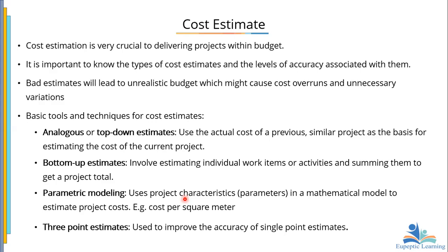It involves estimating individual work items or activities and summing them up to get a project total. Between the two of them, we know very well that the bottom-up estimate is very, very reliable. Why? Even though this project that we are doing now is similar to past projects, the conditions may not be the same. And therefore, we would not have a proper estimation which is so accurate. It will only guide us,